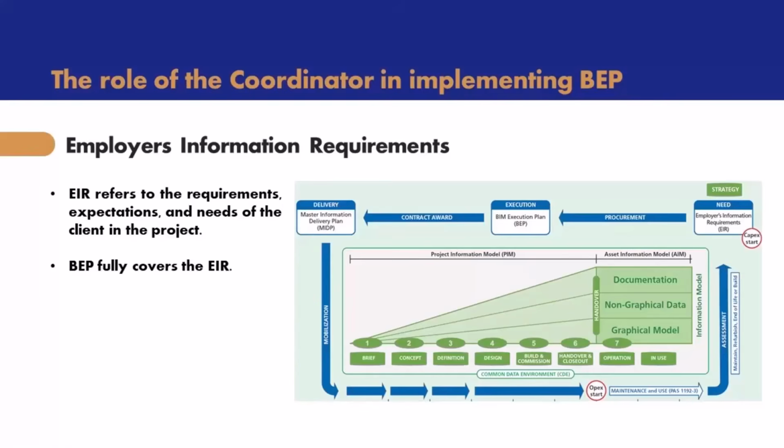EIR refers to the requirements, expectations and needs of the client in the project. In the first step for a project, you need to receive data called EIR from the employer, actually your client, and then reply to that EIR via BEP. Hence, BEP fully covers the EIR.